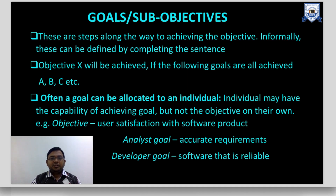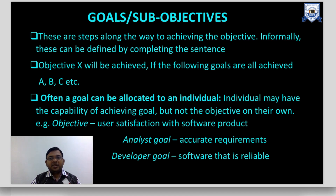Goals and sub-objectives are steps along the way to achieving the objective. This can be defined by completing the sentence: 'Objective X will be achieved if the following goals are all achieved.' For example, software should be of good quality if the developer follows the specific quality standard, the testing team follows the specific quality standard, and the requirement engineers also follow specific standards.